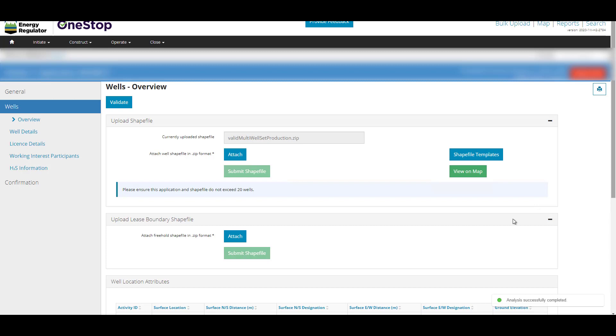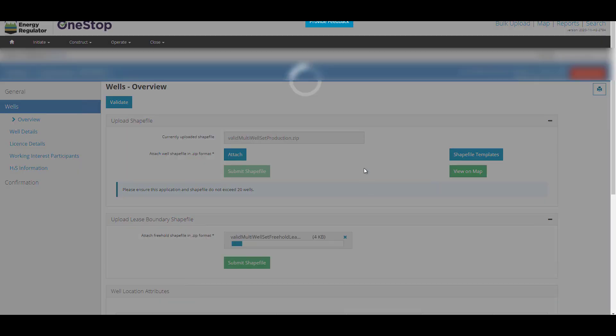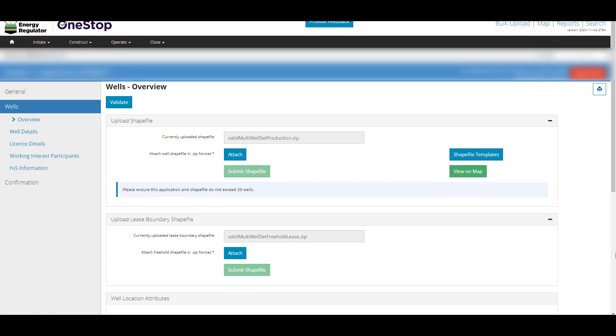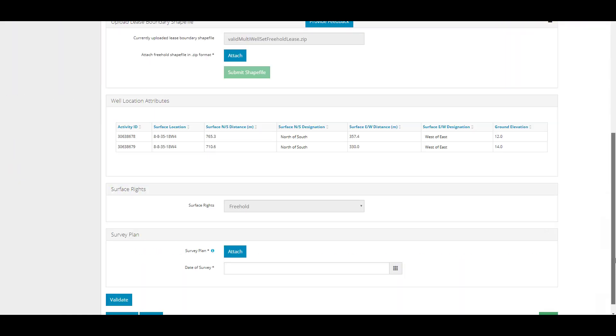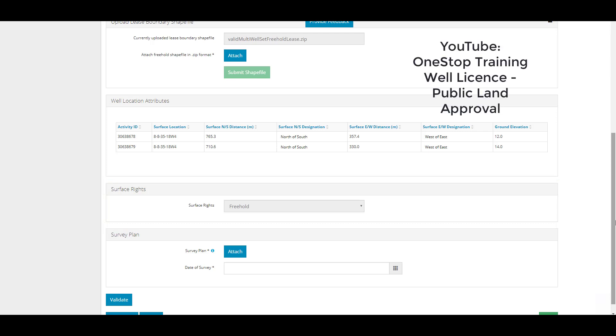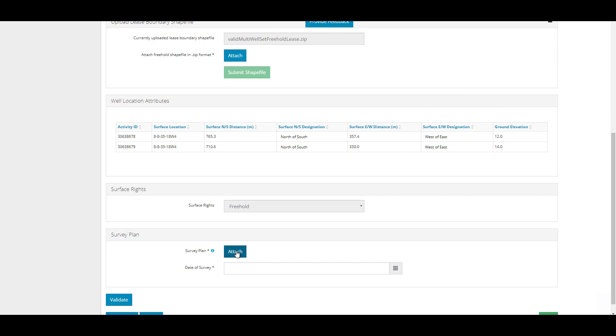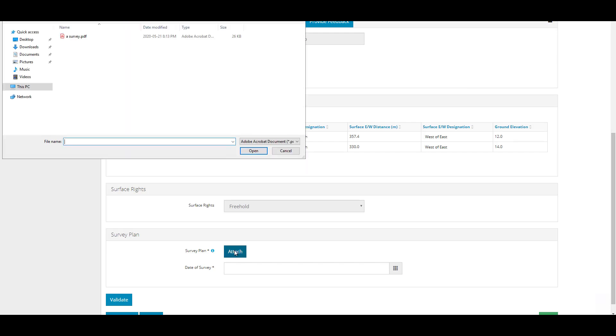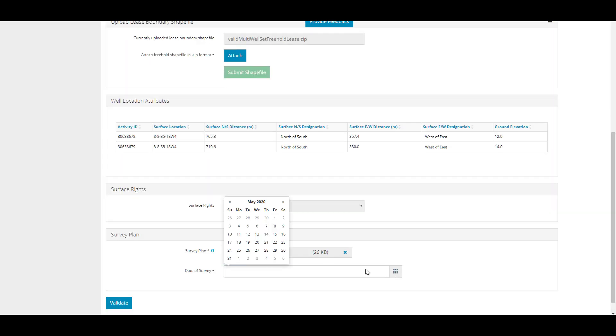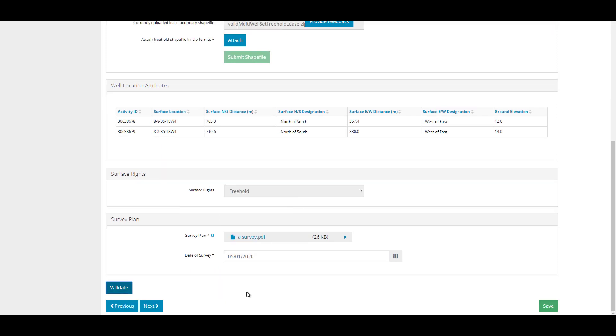If the application is on freehold land, a lease boundary shapefile will also be required. The surface rights are populated through the spatial analysis of the shapefile against the GIS map layers. When surface rights are Alberta Crown, a public land approval section appears and the information must be confirmed or completed. For more information, please search our YouTube channel for the video on OneStop Training Well Licensed Public Land Approval. Attach the survey plan. Enter the date of the survey. It cannot be more than one year old. Click Next.